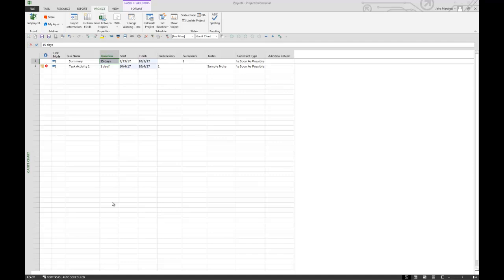I see that oftentimes in schedules, and the impact in terms of hindering dynamic change is substantial. So what we always recommend is to use alternatives when possible. Use your network logic, which we're going to go into a lot more detail when we're actually building the schedule, and use things like deadlines. Always feel free to work with your PMO schedulers to understand a little bit better how to use different functionality to still get the type of information that you want out of your schedule without having to impact that dynamic change.